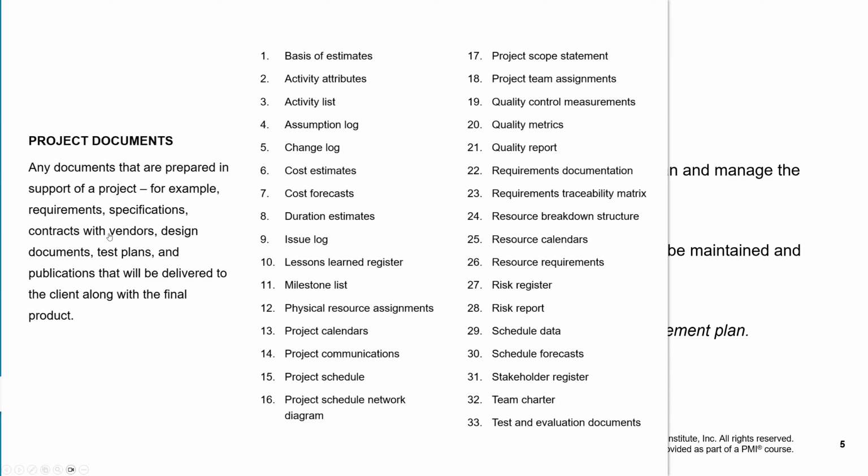And to execute the project, we need not get into each one of these artifacts in the project document, but the baselines are basically to be followed. We have to just accomplish the things by following the schedule, which has been finally established. We have to spend the money on the project as per the project budget, which has been established in the cost baseline. And we have to fulfill the final shape of product scope and the project scope that would be in the scope baseline. So as far as execution is concerned, project documents are no more important. We just have to ensure that the final shapes of scope, time and cost, which were called the baseline, are being followed.